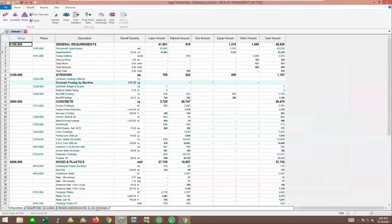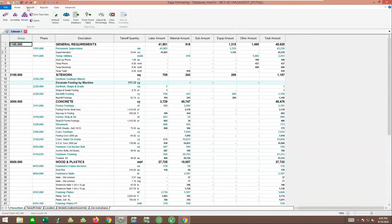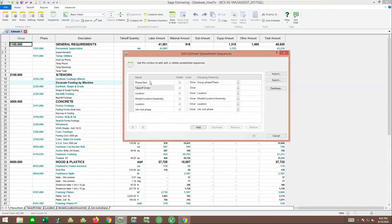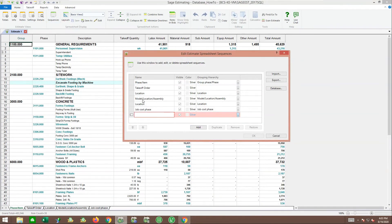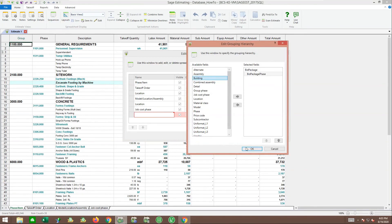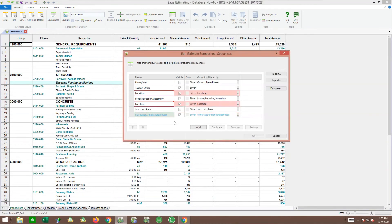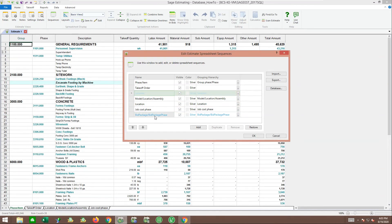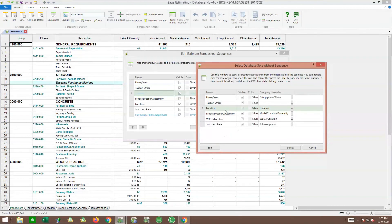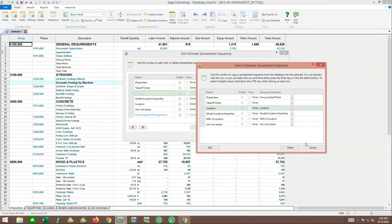I didn't set my sequences up as a standard one, so that's another thing to look at. When we went into that other job, we set up sequences and added one for bid item, bid item package, and bid item phase. This is something that going forward, I probably want to take the extra time and go to my database and set those same sequences up, so all future estimates would have this bid package and package phase.